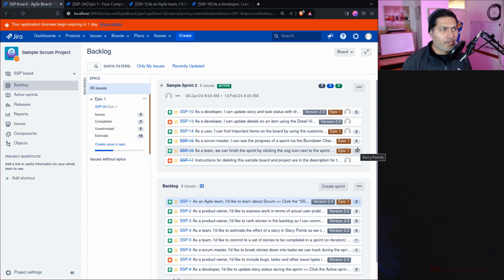Now, it could be story points, it could be original estimate. Let us say we are talking about some estimate. At the epic level, you may want this number so that you can total it, and you can then use this number for capacity management. You can use this number for maybe doing some budget planning for the next quarter. And this is something that I totally understand. It could definitely be useful.